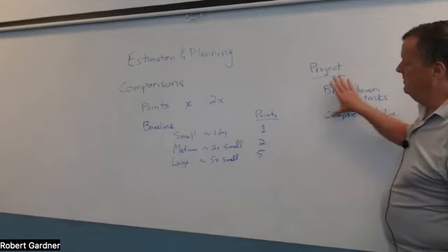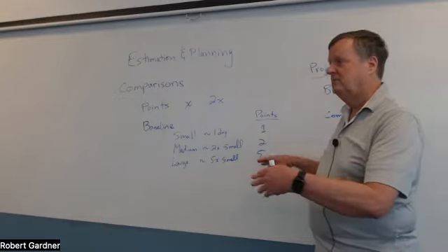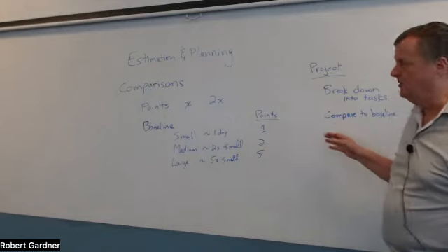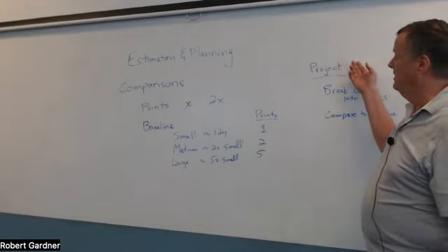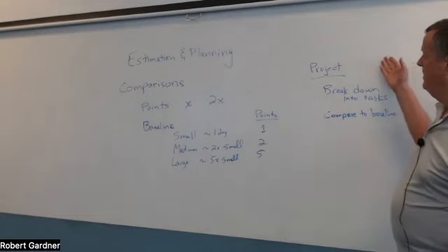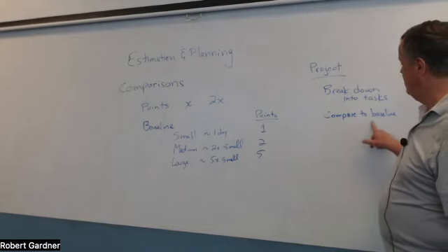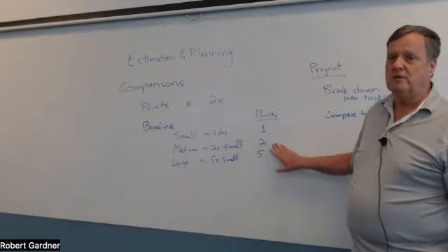So that's what I've done now. And now that I have that, I can take all those tasks and just sum them up. That gives me my point total for this project. I can now say this project is a 60-point project because I've been able to do all this breakdown. Okay. By the way, when you do this comparison to baseline, you don't do it with one person.